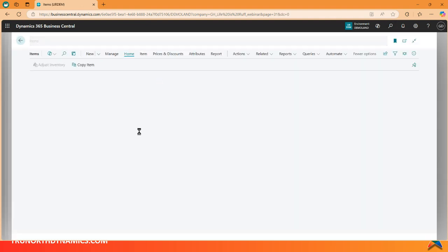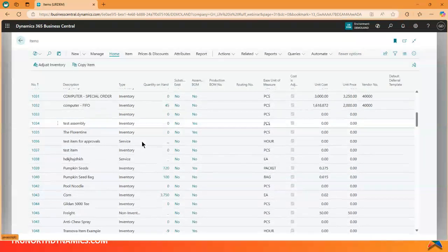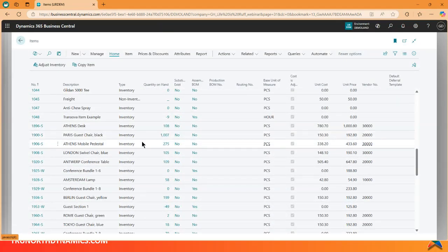Now, if I'm selling items on my project or consuming an item on my project, then I want to make sure it's in inventory, right? I can add the item to a project out of the box, and then when we are using it or have sold it, it would decrease the quantity over in our subledger and send it over to the GL also. But you can also add items via a purchase invoice or a purchase order. So maybe you don't want to pull it out of inventory, or it's an item that you haven't stocked in the past. That's okay. You can use purchase invoice or purchase order, and I'm going to show you what that looks like in just a little bit.